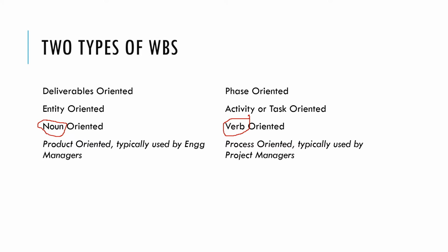Now, is there a hard and fast rule that as a project manager, you should be creating only phase oriented WBS? There's no rule as such, and you should create WBS as per your needs and as per the practice which is followed in your organization.